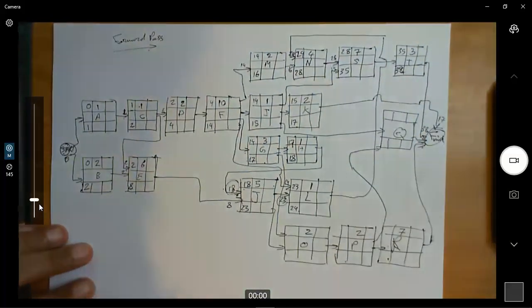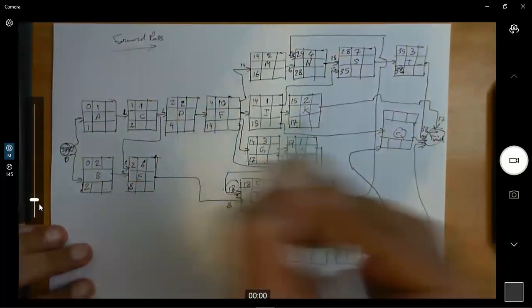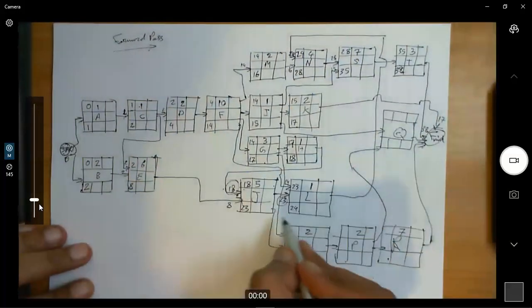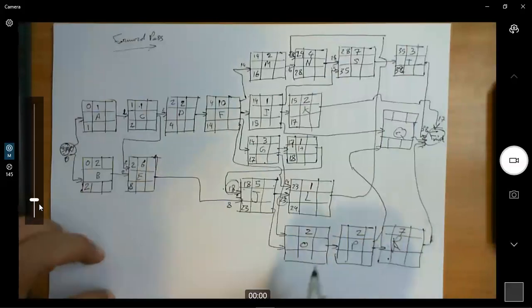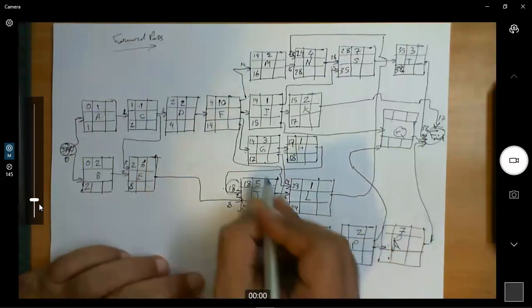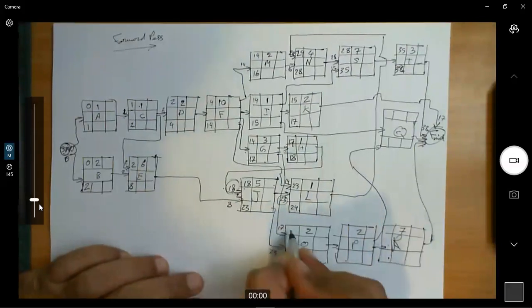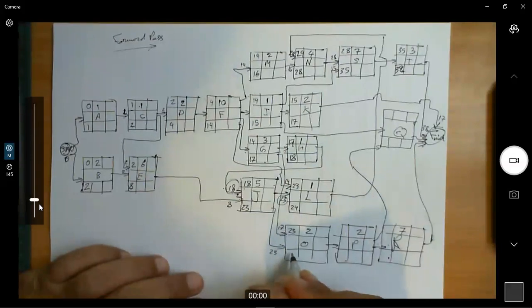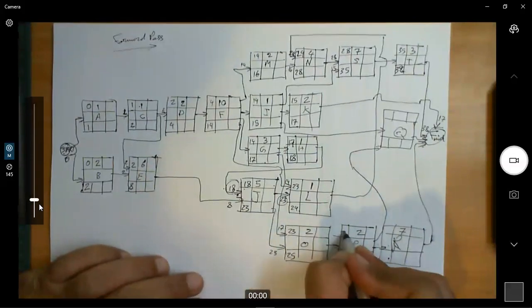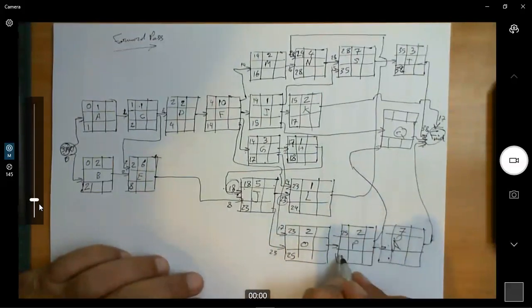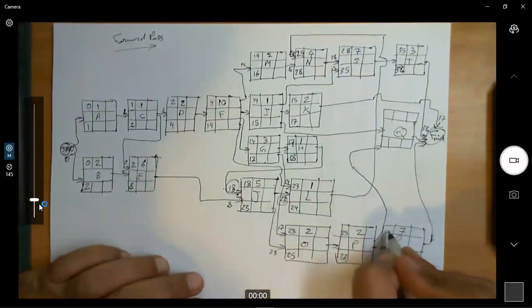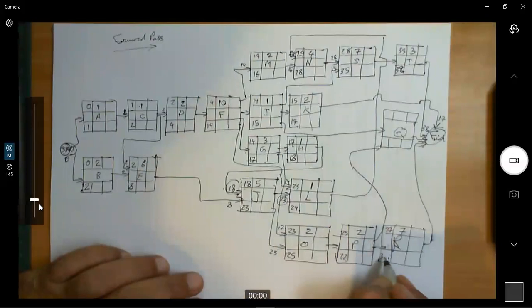Okay. So we are not done here. We need to finish here. To see this arrow, it comes with 17, and here with 23. So we take the 23, 23 plus 2, 25. So we have 25, 25 plus 2, 27. Then here 27, 27 plus 7, that's 34. So we finish here with 34.